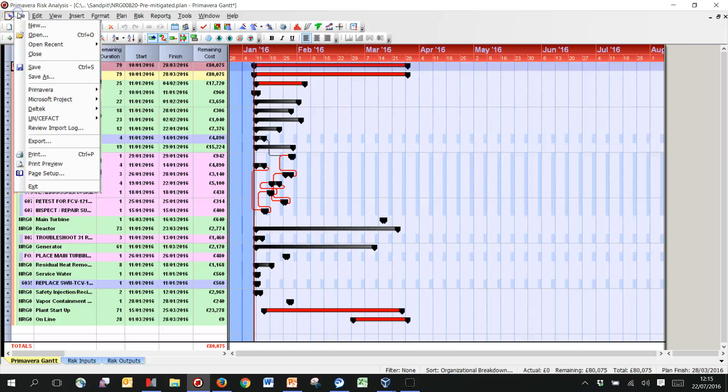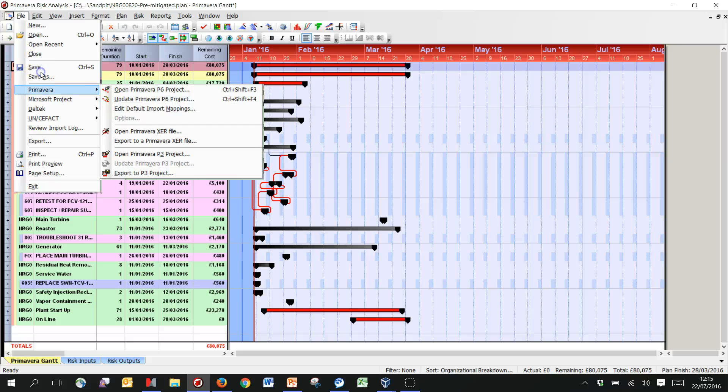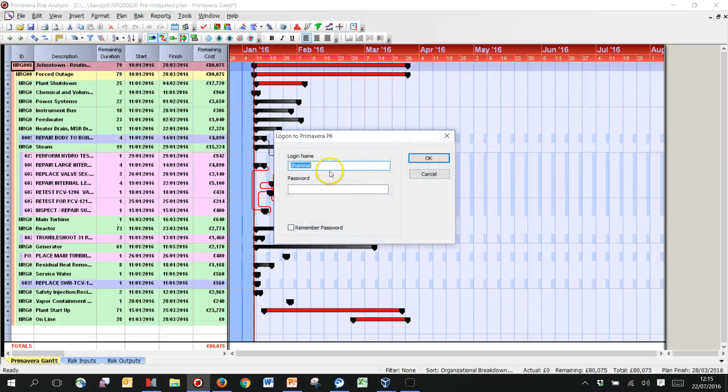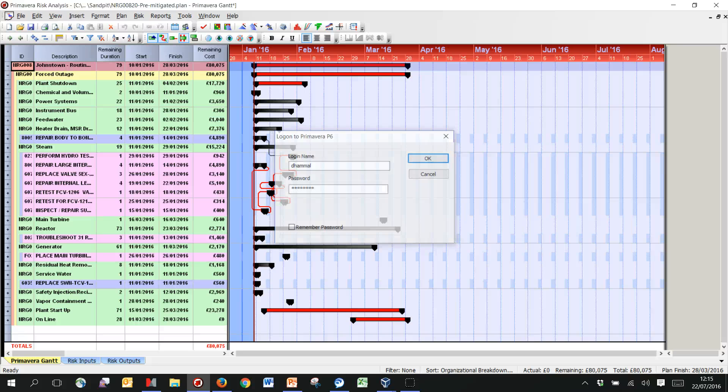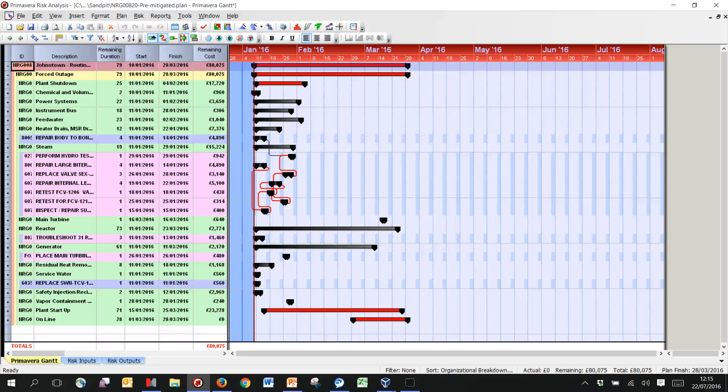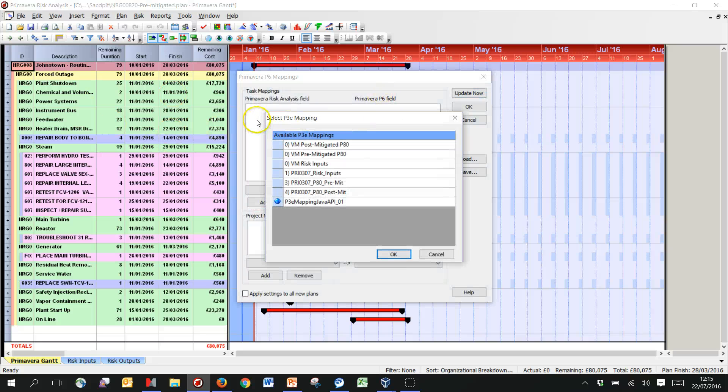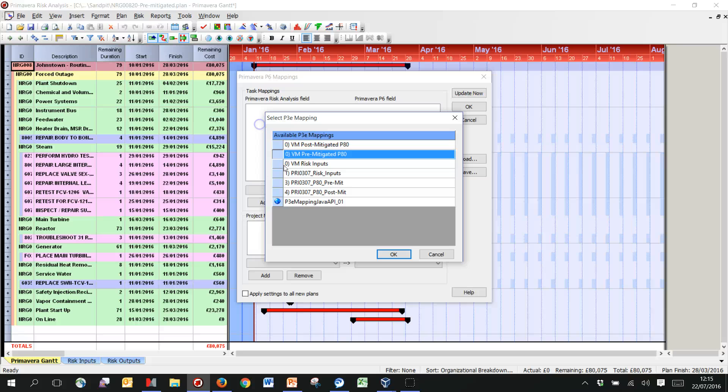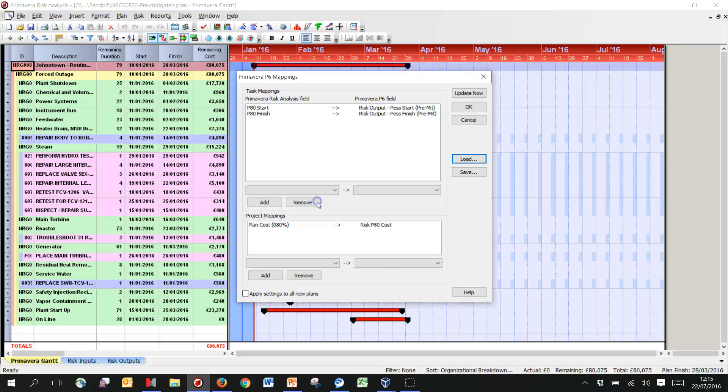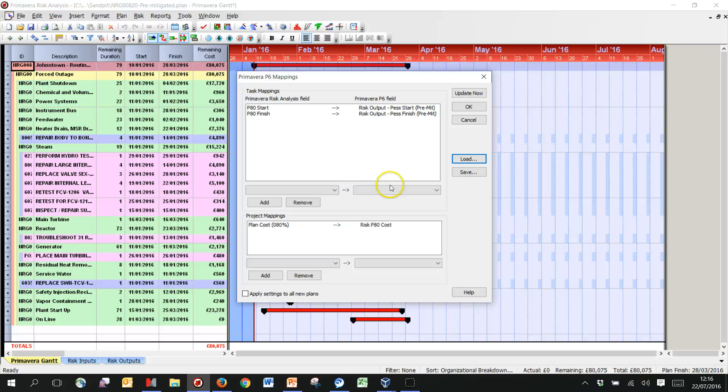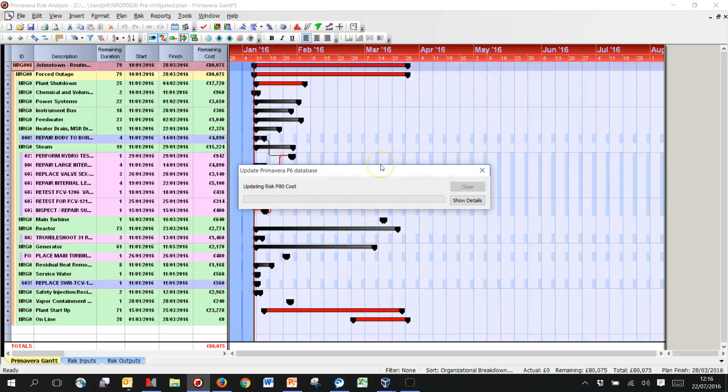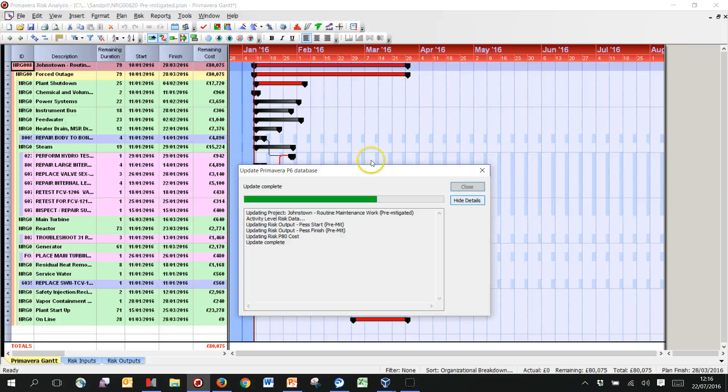So having ran our simulation here, we can pop those values back into P6. I've got a template here working on my VM, it just maps the planned cost P80 back to the risk P80 cost. I've also got some start and finish dates here for schedule stuff, but this cost one is really what I'm focusing on here. Click on update, this all works well, then you should get this update complete with a little warning here if it doesn't.